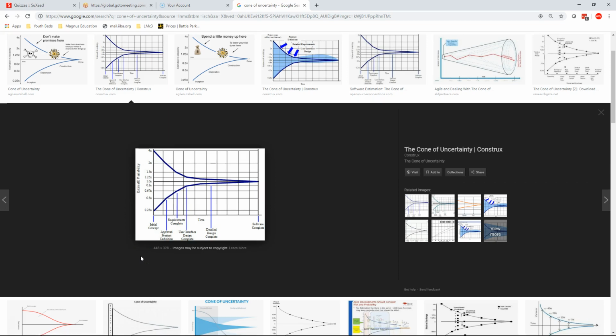No, because we haven't dug into anything. I really don't know. I have a thought in my head about what it might be, but I don't know. And then the further along we get, once we get to requirements, if I still think it's going to be about a year, now I can say, I think it's going to be 9 months to maybe a year and a half. So now I'm narrowing my estimation down.